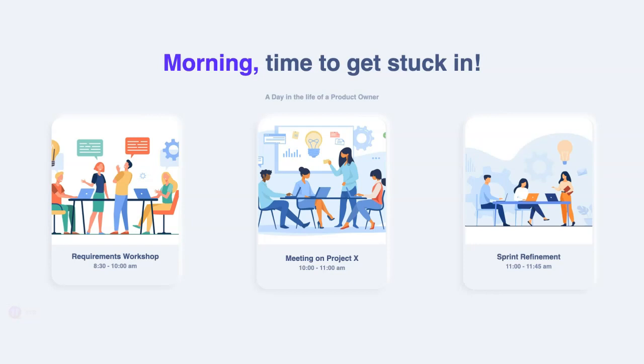Moving on from that, at 10 o'clock, I'm going to go for a meeting on Project X. Now, Project X has a real dependency on my project. They're delivering a significant portion of the back-end services that will mean that my product, my app, is actually going to function. I need to understand what they're planning on delivering and when. Understanding those dependencies, the risks associated to them are absolutely integral if I'm going to ensure that we can deliver the product and the maximum value as soon as we can.